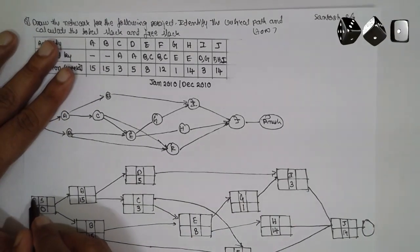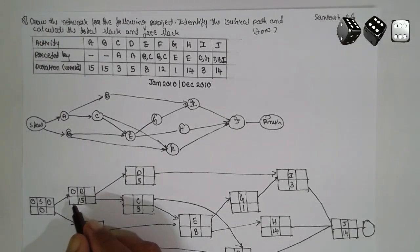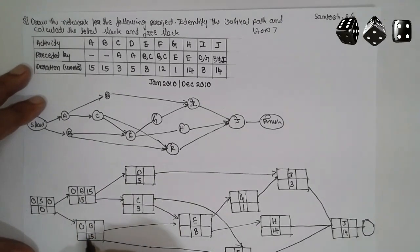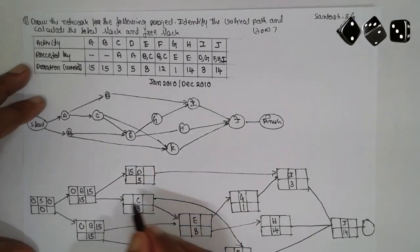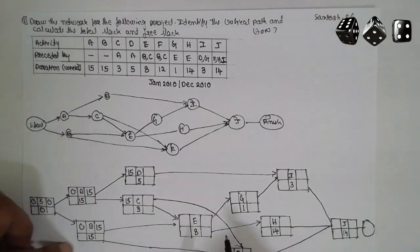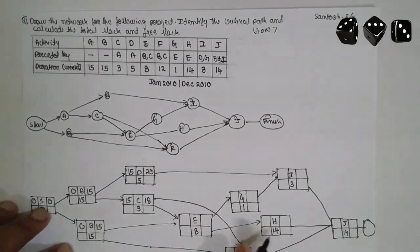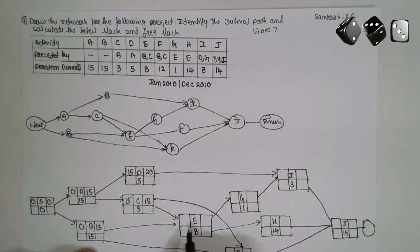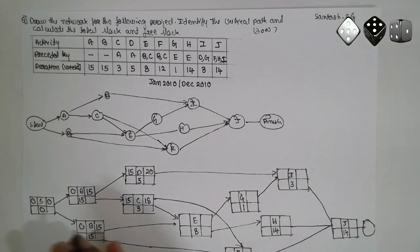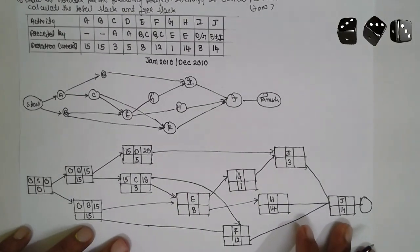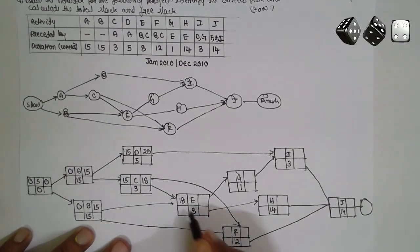Now consider 0. 0 plus 0 equals 0. Move the 0 here. 0 plus 15 equals 15 — move the 15 here. 15 plus 5 equals 20. 15 plus 3 equals 18. Now it is a junction here — when moving from left to right, you have to select the larger value. 15 or 18 — select 18. 18 plus 8 equals 26.